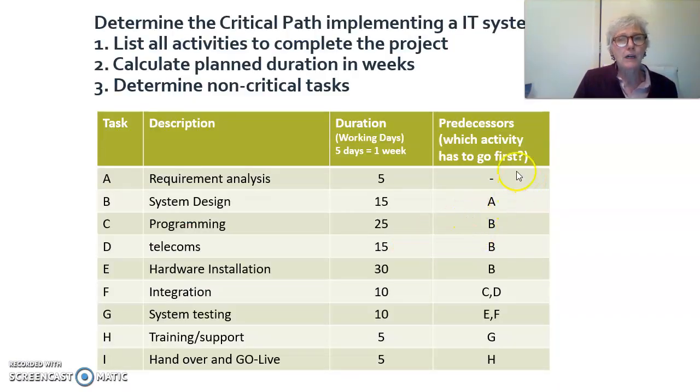A critical path is, for example, in implementing a new IT system, that first you have to list all activities to complete the project. Secondly, calculate the duration in weeks. And thirdly, determine the non-critical tasks.